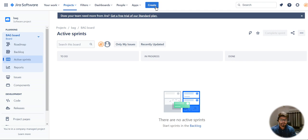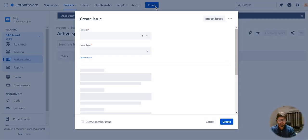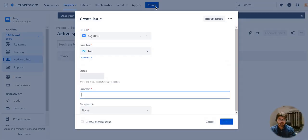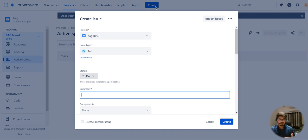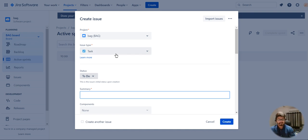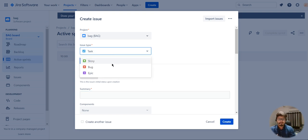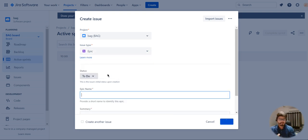To create any user stories you should have an epic. An epic is a higher hierarchy above a user story, so the user stories come after the epic. I am going to create an issue — any task in a Jira board is called an issue. I am going to create an epic first.